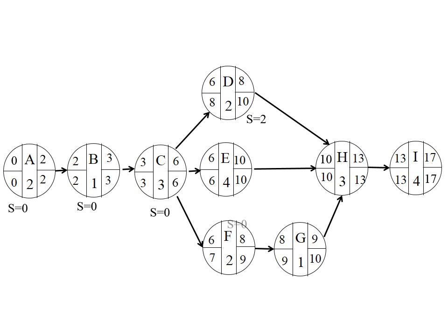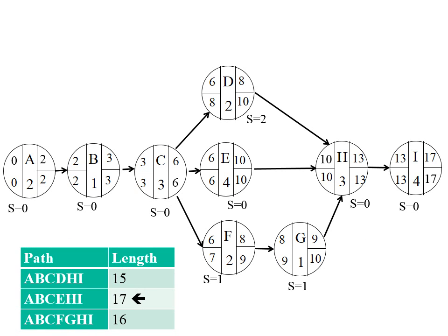Task C similarly will have a slack of 0. E has a slack of 0. F, do you agree that has a slack of 1? The latest you can start is 7, earliest you can start is 6, so you have 1 month of leeway. You have a little bit of playroom. Okay, you can calculate the same 1 by subtracting 9 minus 8. And you can calculate these things.